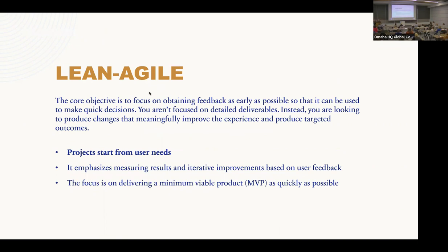Another type of Agile is called Lean Agile, which adds a method of lean thinking to the agile process — lean meaning something that is more efficient while creating less waste. In Lean Agile, the core objective is to focus on obtaining feedback as early as possible so that it can be used to make quick decisions. You aren't focused on detailed deliverables, but instead you're looking to produce changes that meaningfully improve the experience for your users and produce targeted results. Projects start from user needs, emphasize measuring results and iterative improvements based on user feedback, and the focus is on delivering a minimum viable product as quickly as possible. Essentially, Lean Agile is about doing as little as possible to work as much as you can — that more efficiency with less waste mindset.